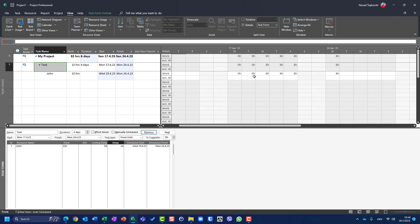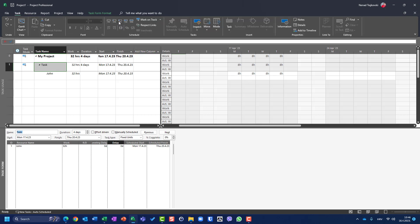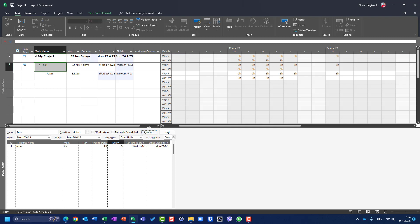That is very simple. Now, what happens if John has finished 50% of his work — he already worked on Monday and Tuesday? I go here and mark this task as 50% completed. Now he has a delay of two days. I will enter two days and click OK.